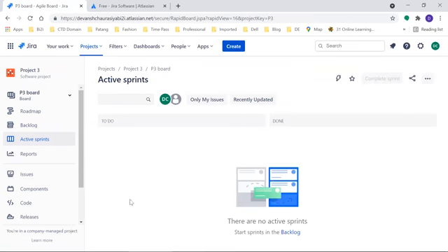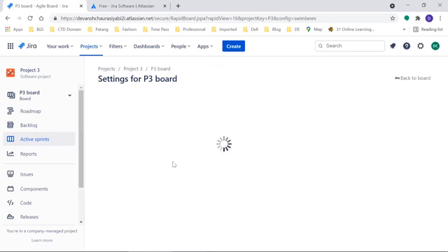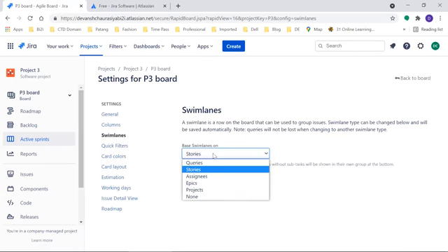We will have stories. Stories can be just like in a swimming pool, we have lanes. So it will create a kind of lane. We'll have either the lanes by assignee, so it will have my name, Devansh, and everything aligned to it, like a category. Or we can club it by color, or we can club it by done or not done. So that's called the swim lane. So we can club it by stories or assignees or epics or projects. Right now it is none.